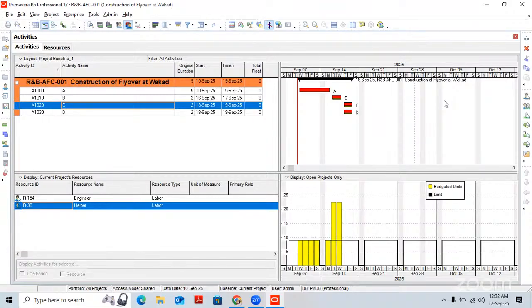That's the monitoring. See, first we will discuss planning. In planning, first of all, you have to list out the activities you are going to carry out in your project. Then you have to link them in an appropriate sequence, or you can say proper sequencing. In proper sequencing, you come to know that some activities are coming into the critical path and some are coming into the non-critical path.